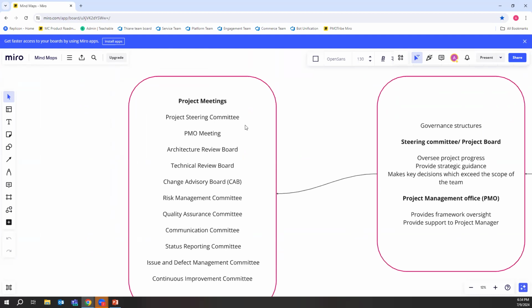I would close that feedback loop because a lot can happen within a month and there are a lot of surprises. The other challenge that I forgot to mention is that if you're in an environment that is politically charged, this can be a very, very difficult conversation to have. This is an actual example: you have a risk that you need to log in your steerco, and you generally send out your steerco pack before the session, let's say a day before, or a few hours before, and your risk sits in the department of one exec. He possibly feels that mentioning this risk exposes him or makes him look incompetent. That causes issues, right? So now you have people calling you an hour before saying, take this off the steerco pack, I'll sort it out, but the problem is that the risk is still there.